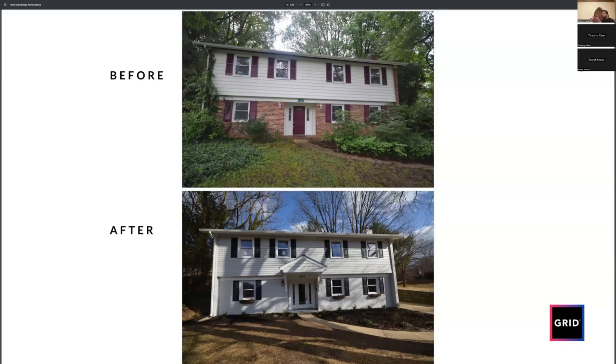If you're doing a flip or even a BRRRR and you use a fix and flip loan where the bank's giving you 80% of the purchase price and 100% of the renovation costs, overinflate your renovation costs, right? Because you're going to need it. I've never been in a situation where my contractor came in under budget. It just doesn't happen. I'd rather be overestimating, but again, this just factors into how much you offer for the property. So you're building that estimation into your initial offer on the property, right? If my renovation budget is 115 versus 100, I'm going to offer 15 less for that house than I would have if I based it on my contractor, right? And hey, if your contractor comes in under budget, you made more profit. So, good business, right?